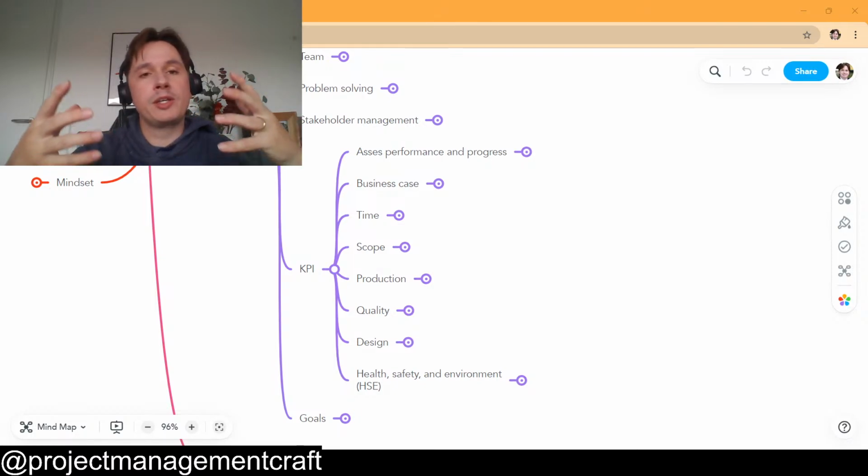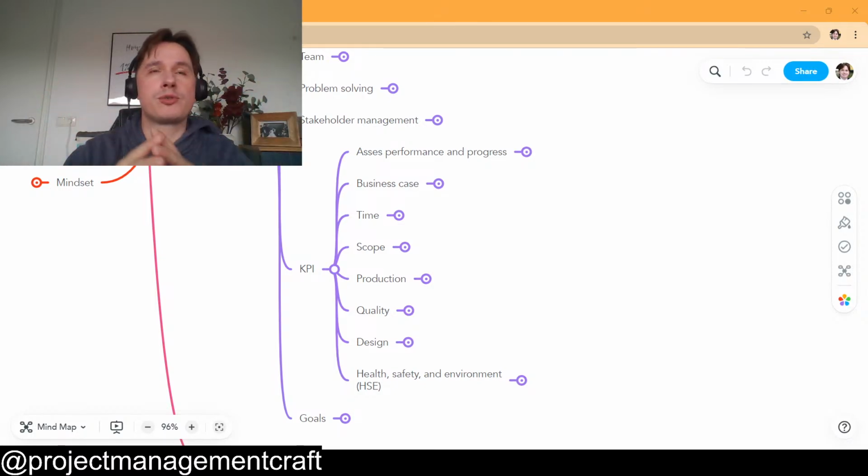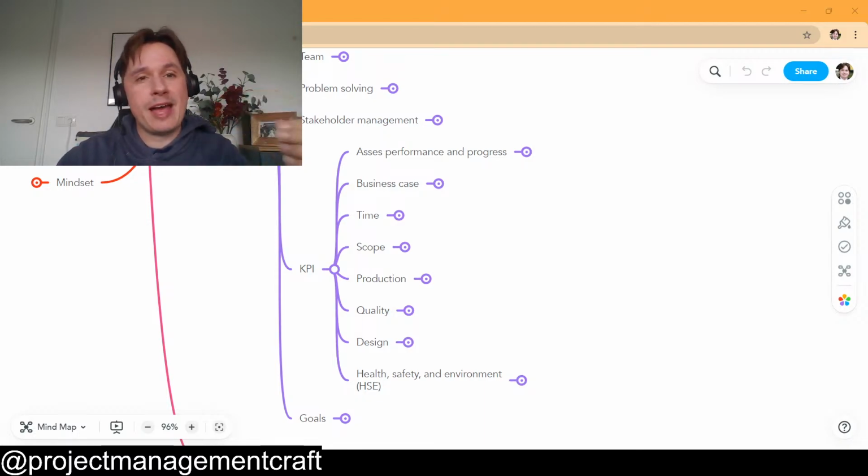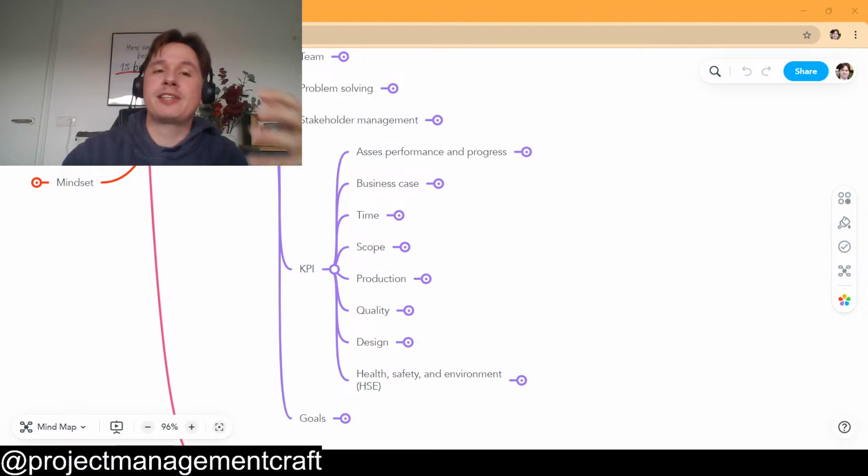For example, if you're looking into an agile project and using Scrum, your velocity will not tell you much, because it just says you did a lot of stuff. It does not say anything about the quality, not the quality per se, because if you're following the definition of done, that should guarantee the quality of what you're doing, but it does not say the value that you're adding there. So you can look for different KPIs to see the value added. For example, after a release, what is the number of customers using it? What's the usage of a specific feature that you've delivered?